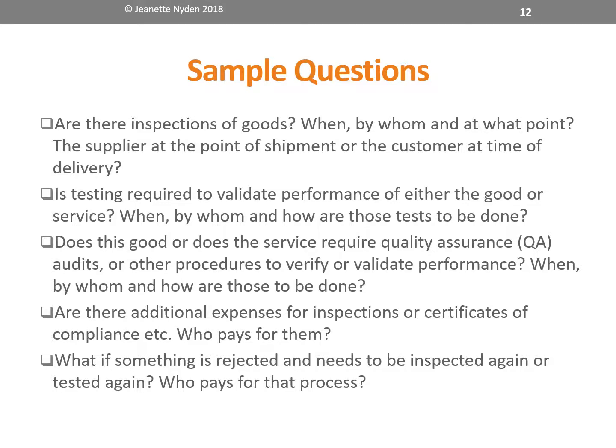Here are some more sample questions from that Playbook contract management plan. Are there inspections? When? At what point? The supplier at the point of shipment or the customer at the time of delivery? Is testing required? Does the good or service require quality assurance audits? Are there additional expenses for inspections or certificates of compliance, and who pays for them?